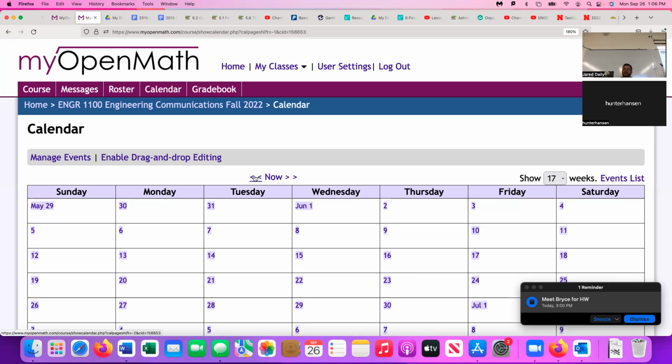What you want to do is have a good, I would say, 10 to 20 tasks, somewhere in that range, that are more like plan. One of the first things you might do is plan the teams. You might be looking to bring together some experts in different fields to give you some experience in different parts of building a bridge. That's a task. You're forming a team or putting together a team.